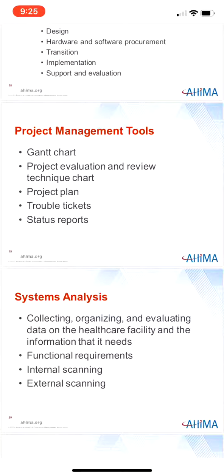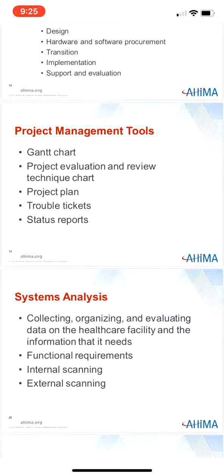Status reports are periodic updates on the current state of the project, what has been accomplished, and what issues have been encountered. Solutions for issues should be identified in the report. Status reports are typically directed to the Information Project Steering Committee to keep the group informed on the project's progress.